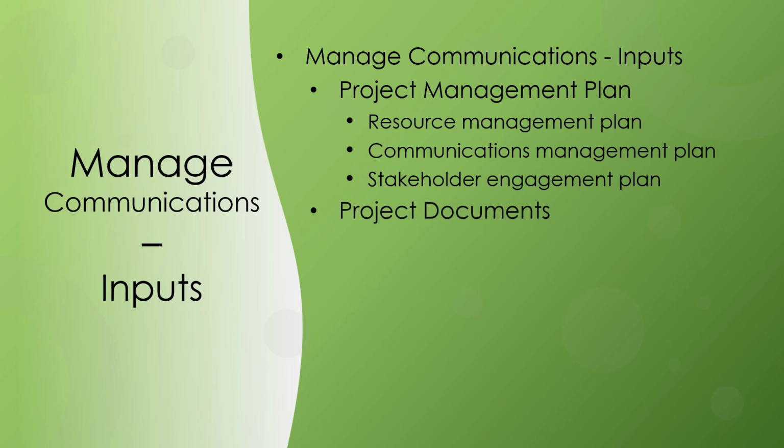Project documents that can be considered as inputs for this process include the change log. The change log is used to communicate changes and approved, deferred, and rejected change requests to the impacted stakeholders. Issue log: information about issues is communicated to impacted stakeholders.